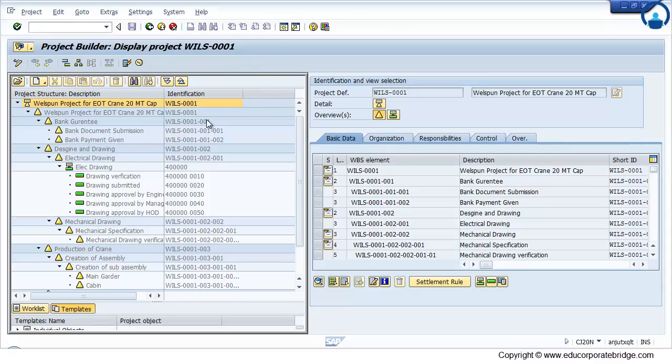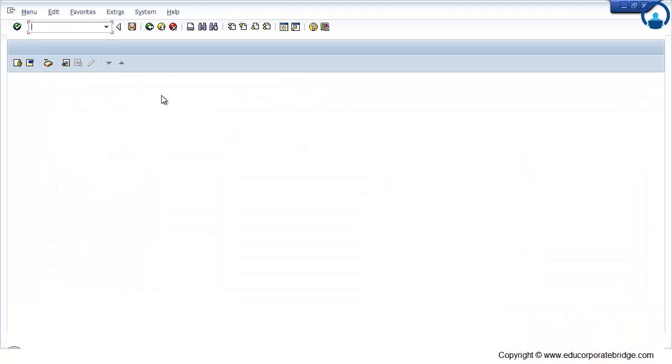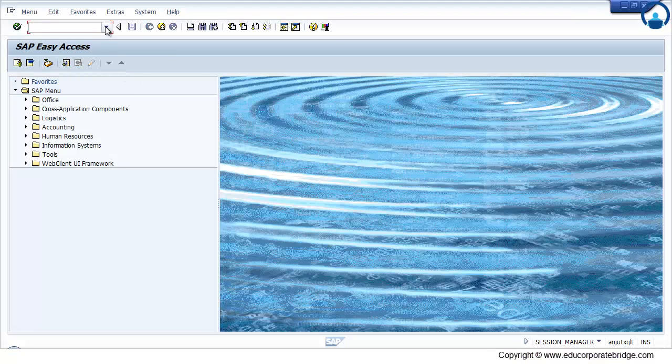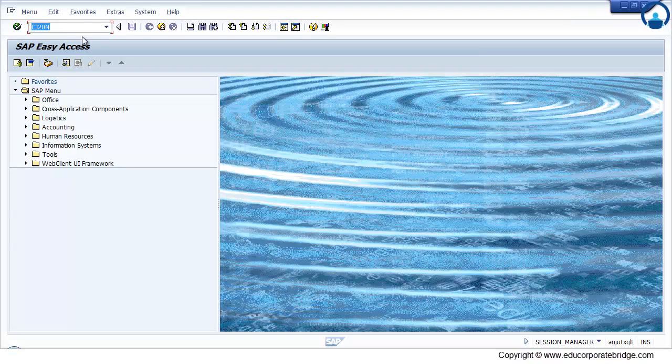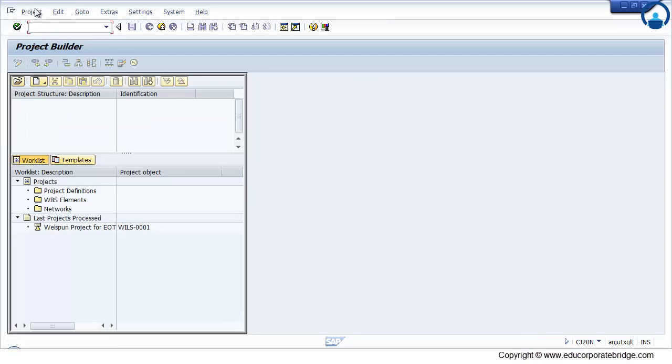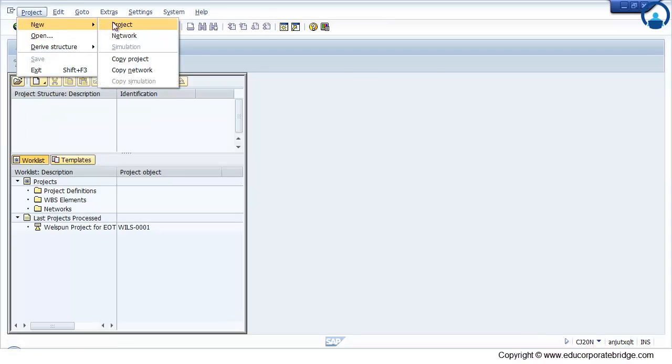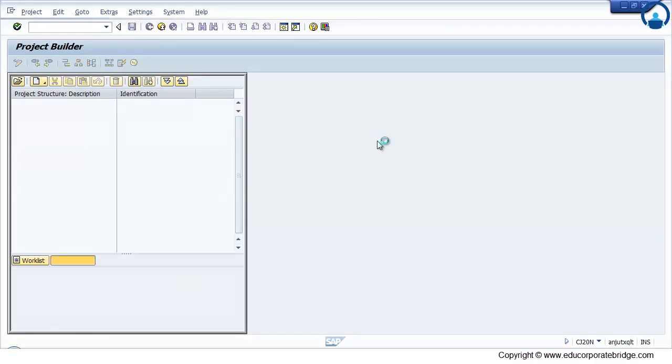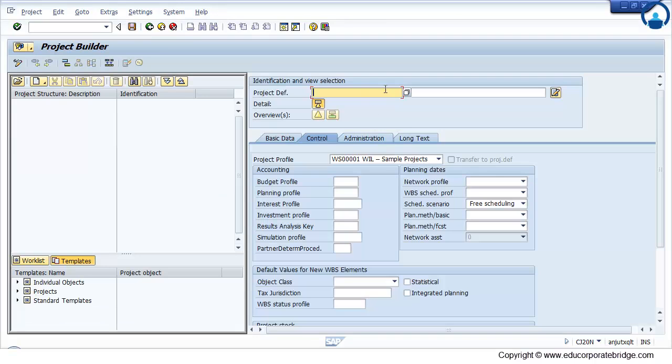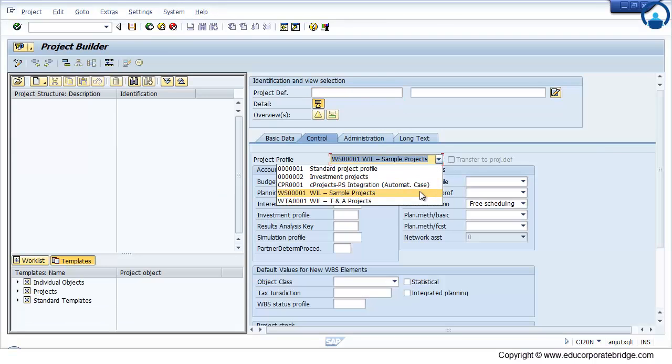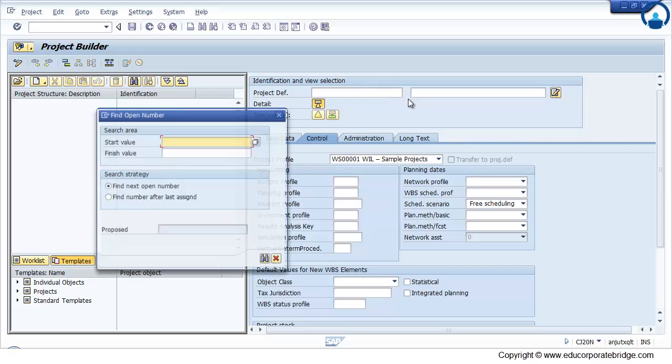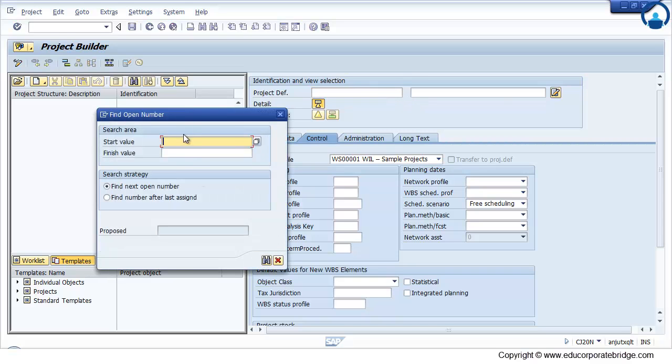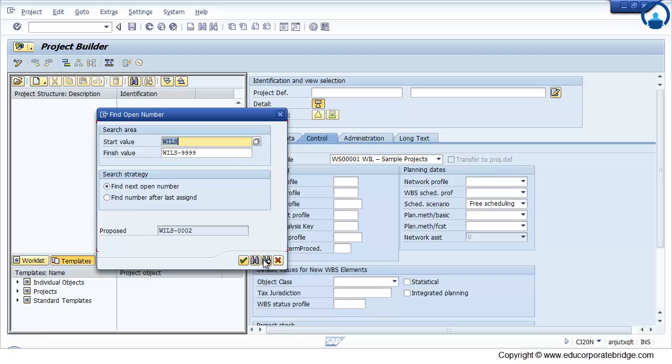Now to create project manually without having standard template, I just click on the CJ20 and project new project. I have to first select the appropriate project profile. Then I have to double click and find out the next open number. So one project is already created in the system, so system will propose me the next number, that is 2.